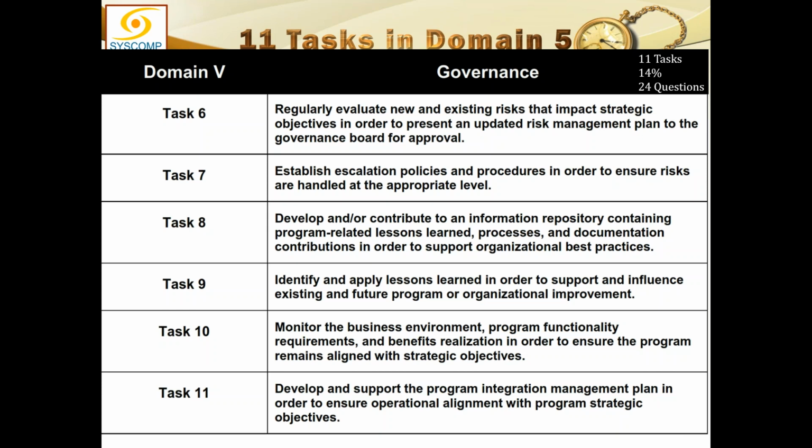Task number 11, develop and support the program integration management plan in order to ensure operational alignment with the program strategic objectives. So what is the program integration plan? The program integration management plan is the program management plan which encompasses all other management plans into itself. All that has to be integrated and form one single plan, and this all is to ensure that you are still in alignment with the strategic objectives of the organization.